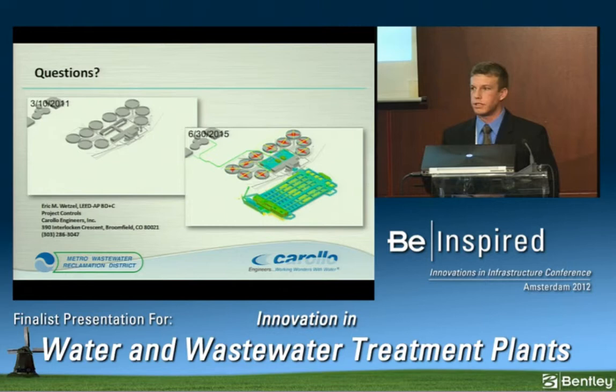Everybody in here, I assume, is in wastewater, so you know that these galleries are full of small bore piping, full of couplings, full of elbows, things like that, all need to be in the schedule. And there's really only one way to validate that, and that's to go through every item. And we do that by linking to the model sets and then watching these videos to see if we can find conflicts.